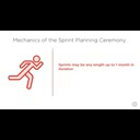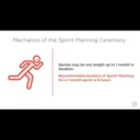And while we're discussing our sprint length, remember that since today is a Wednesday, we'll be planning a 2-week sprint that starts today and completes at the end of the day Tuesday after next. The second point I'd like to remind you of is that the Scrum framework specifies that a sprint planning session for a 1-month sprint should be 8 hours, while planning sessions for shorter sprints should be proportionately shorter. Since we're planning a 2-week sprint, we'll time box today's session at 4 hours.